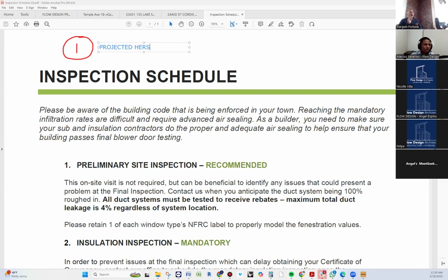It includes general information of what they estimate you're going to be using for dishwasher, what you're going to be using for range or stove, for microwave, for washer and dryer. That's why it's important to tell them what you think the type of fuel is going to be: electric, gas, propane, or oil. Because they are going to start looking for efficient units to use on that. So it includes a projected Hertz, which indicates an index of the projection for the particular project, like how much it is going to consume. Step 2 is called mid-inspection.